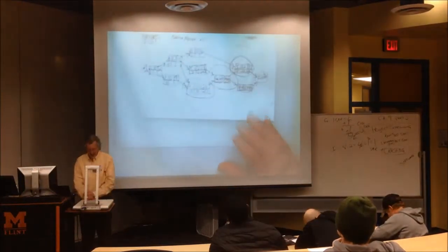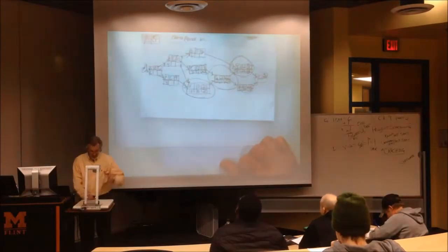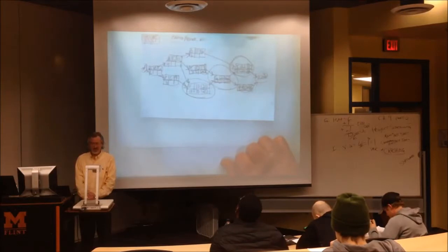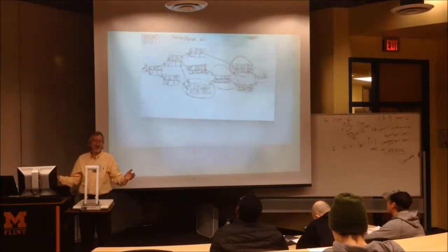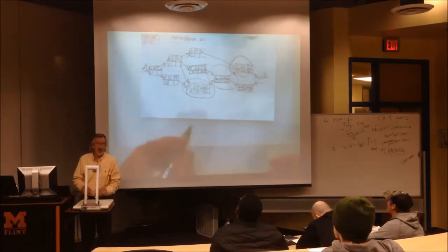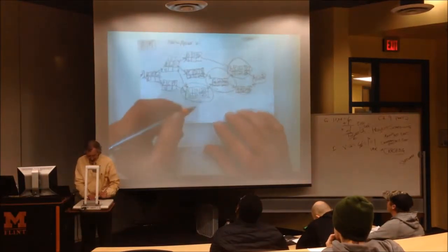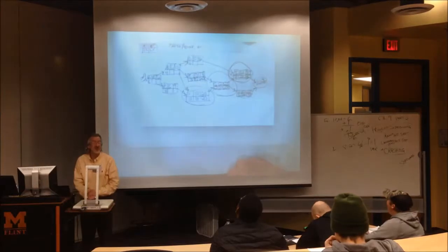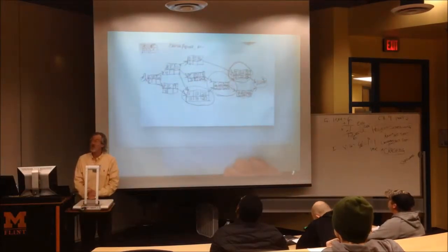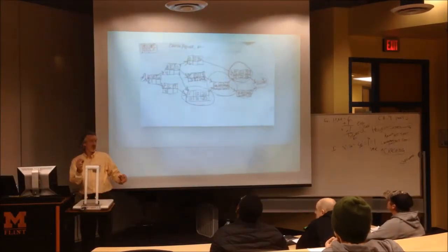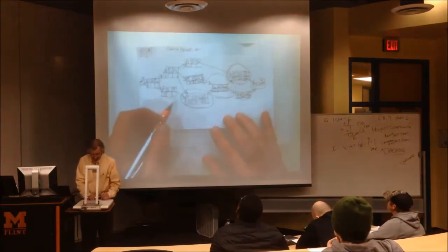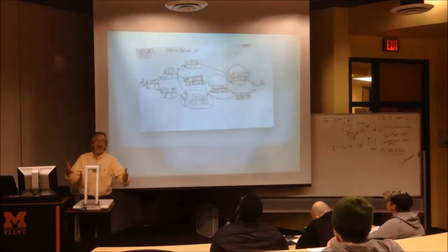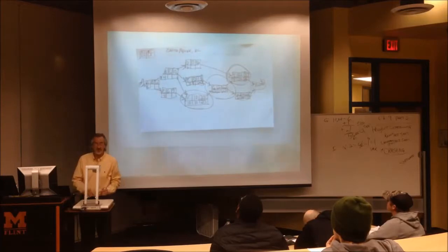Look at the slack there. E didn't show up on day 10. I'm not worried about it. I'm not even bugging them yet. They didn't show up on day 11. Still no worry. I forgot about them. I'm so not worried, right? We got all kinds of room to play there and not have to hold up the project. How much room do we have? How many units of time is our slack? That's right. Either the difference between the starts or the difference between the finishes. And you have how much slack is in activity in your future, just so you know. So make sure you realize it.